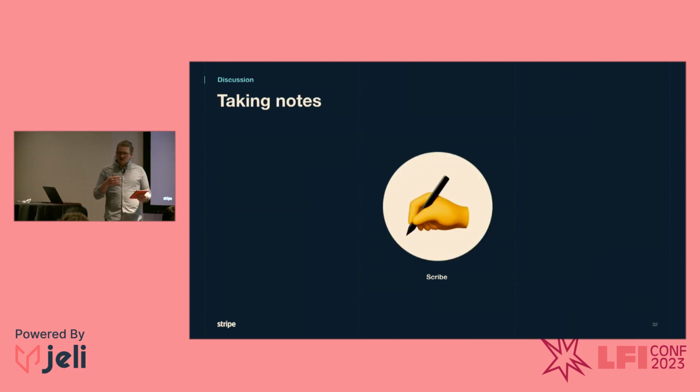So while your team is having this discussion, it's really important for your scribe to take notes. And that's why we've assigned that role to a separate person who can focus on this during the exercise. When taking notes, you want to capture the general sentiment rather than the word-for-word dialogue. And you want to take note of potential improvements, sources of friction, and general sentiment around particular systems.